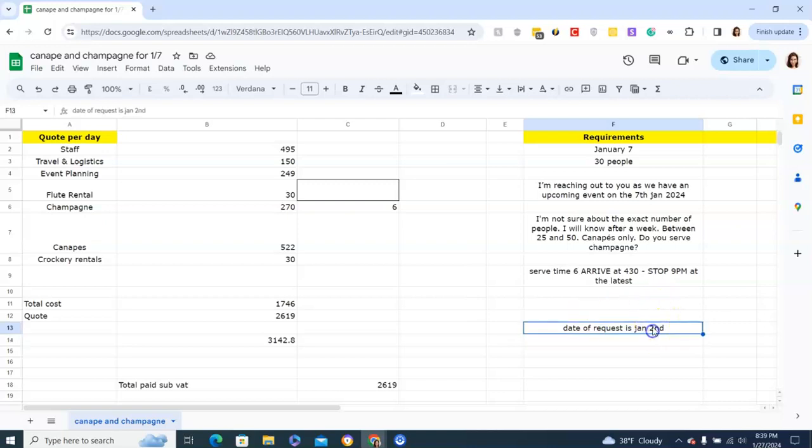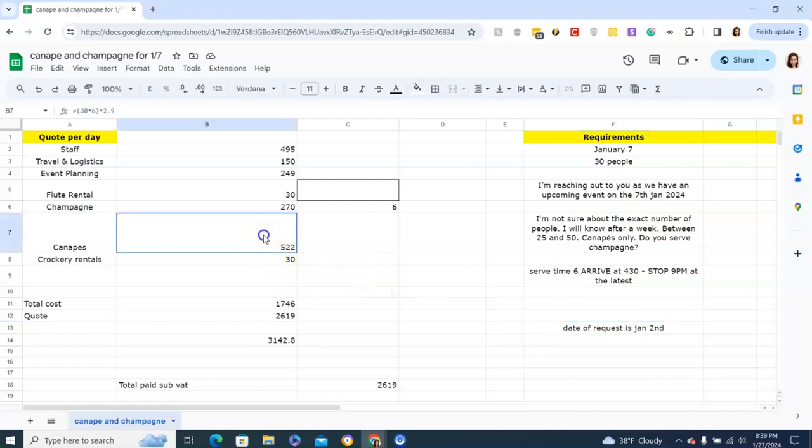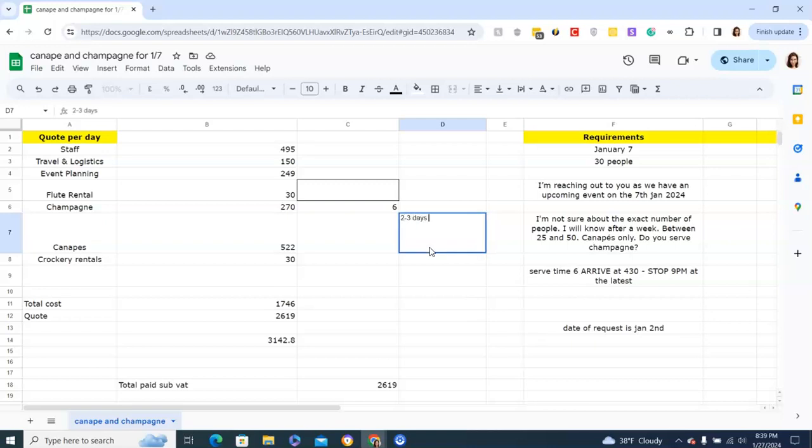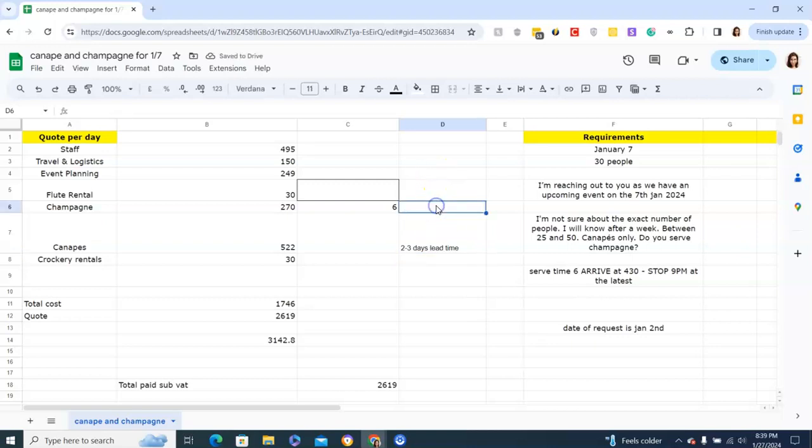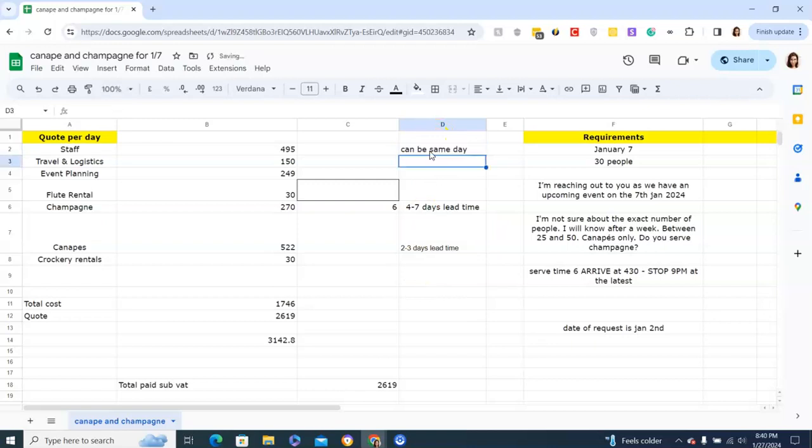Five days is a very short window, and some people don't realize that because you have to order stuff for your canapes. Let's say two to three days lead time to order that. Let's say this is four to seven days lead time for champagne, and it can be same day for organizing staff. Having five days, you could pull it off.